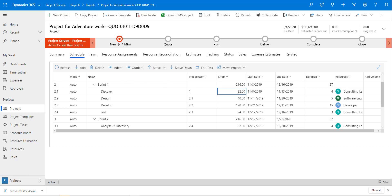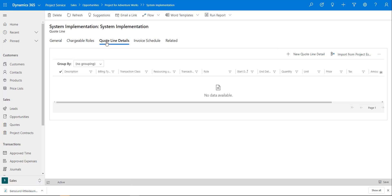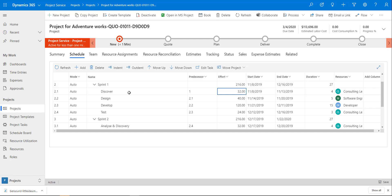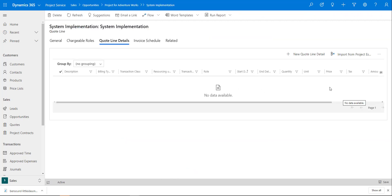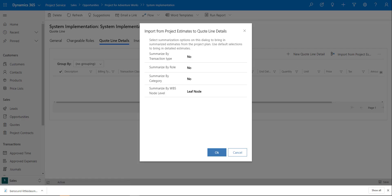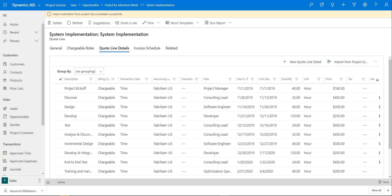Let's go back to the quote line. We can look at the Quote Line Details, which represent everything from the project schedule. When I click Import from Project Estimation, it grabs all the tasks, total effort, duration, and roles and populates them directly into my quote line. I'll select to leave it at the role node level and click OK. We can see the quote line details have now been imported.